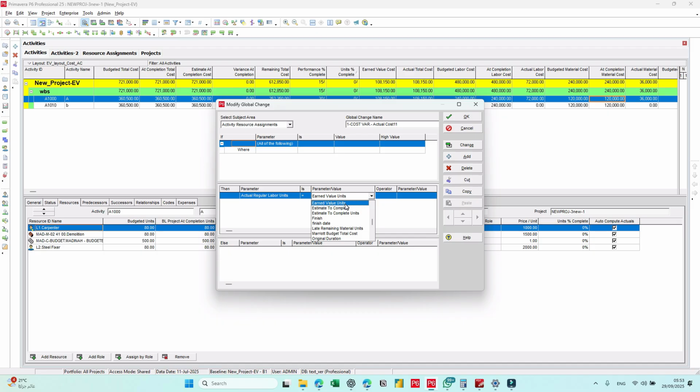We don't have earned value for material or non-labor. Some projects ask you to load the schedule with a resource under material or non-labor to be used for the progress measurement. In this case, again, the earned value will not work for you.